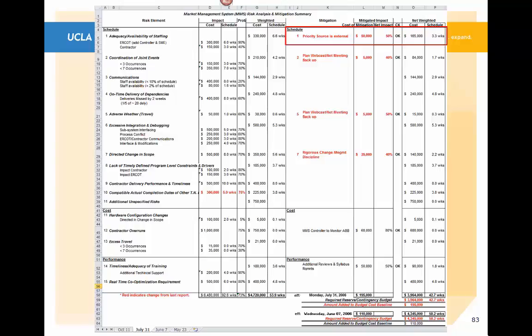We take a look now at the first one up there, and this is again make and availability of staffing. We looked at that risk, we didn't have any mitigation for it. Now what we are saying is our sourcing priority is going to be external. So when we have a problem with staffing, we've set up external methods and external sources to acquire staff to keep us from having that type of impact based on either the customer or ourselves being short on staff.